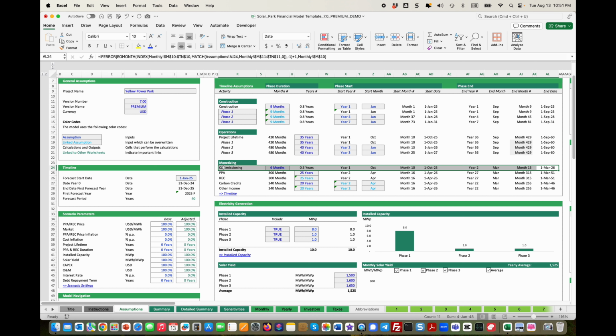And this also means that during that time, the produced electricity is not yet subject to the terms or the price of a PPA. It can be sold at whatever rate can be negotiated. Once this commissioning period is over, you see this starts right away, 6 months, and takes us to March. And then once this is accepted, basically next month, we start with the PPA.